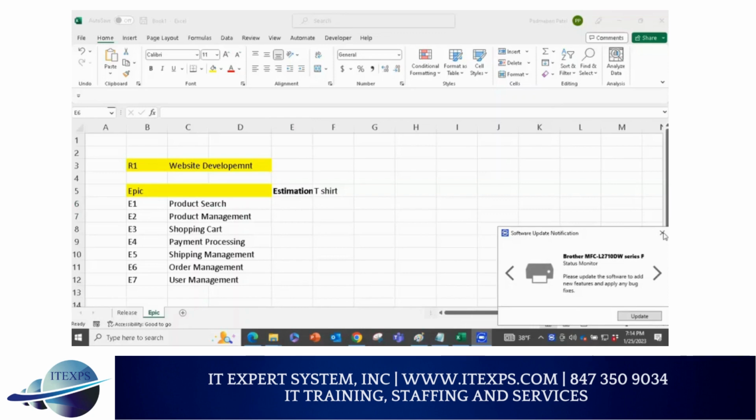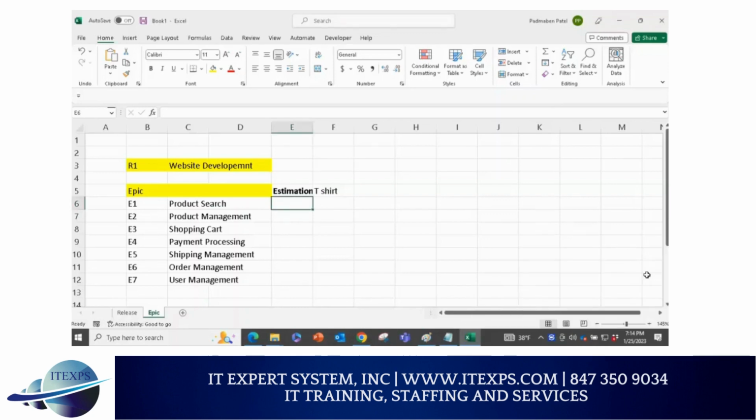Now, company to company it will vary, but we need to come up with a common language. Now, if I ask my team about product search and say, hey guys, what do you think? One says, I don't know product search, I never did it. Another guy says, hey, I have done it. Remember last week we talked about OPM: optimistic, pessimistic, and most likely. And then we say, guys, is it reasonably small, medium, large, or extra large? So what do you guys think?